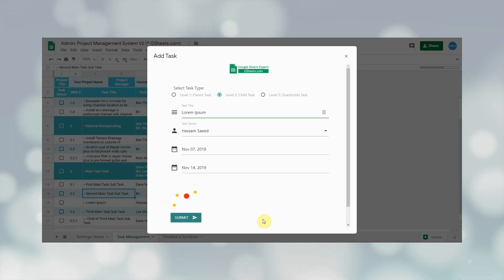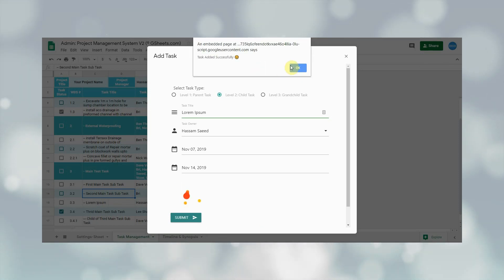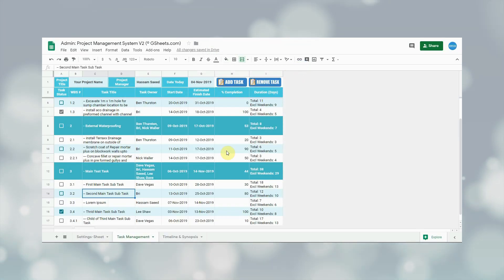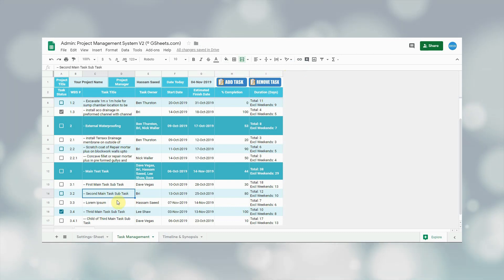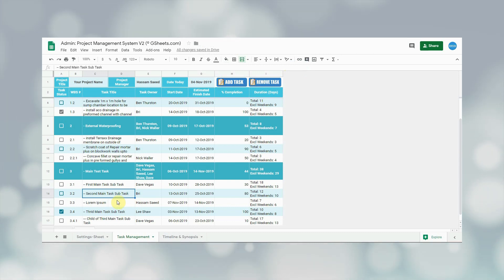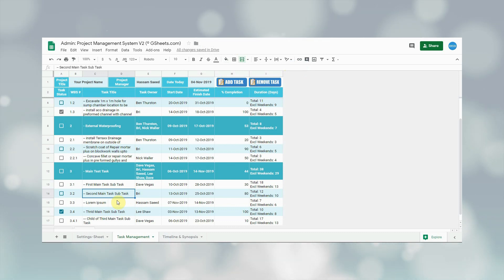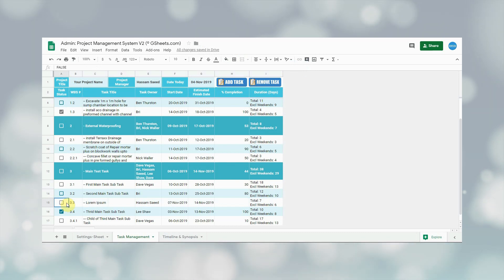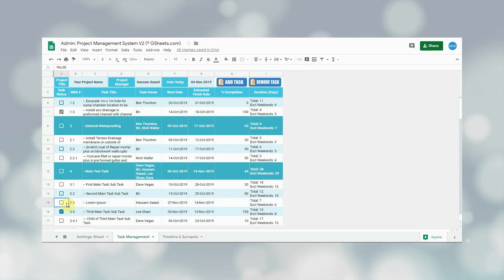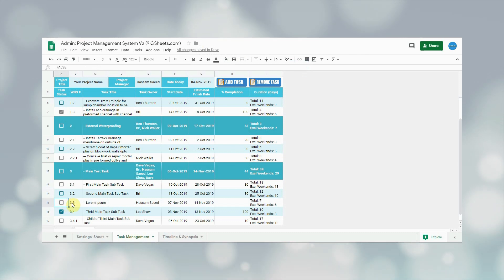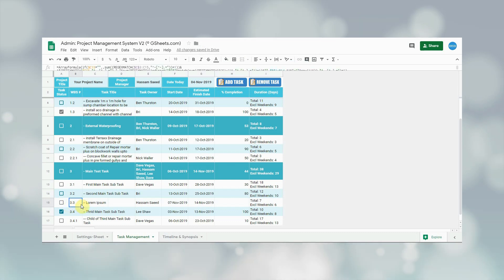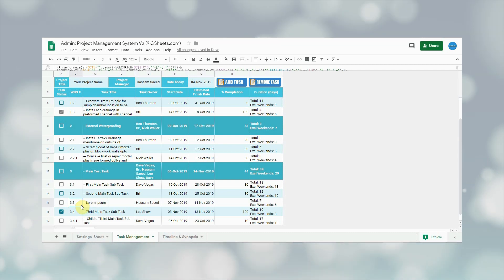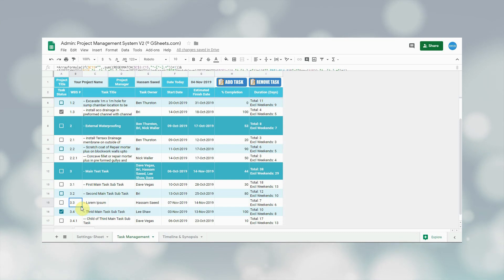After submitting, the user will have to wait briefly for the task to be added. If the task is added successfully, the user will get an alert of successful submission. Click OK to close the alert. The newly added task can be seen on the sheet. The first cell shows the task status, which is incomplete right now — once the task reaches 100% completion the checkbox gets ticked automatically. The second column is the work breakdown structure number; parent, child, and grandchild tasks have different number patterns, and the system auto-generates this number based on the entry.